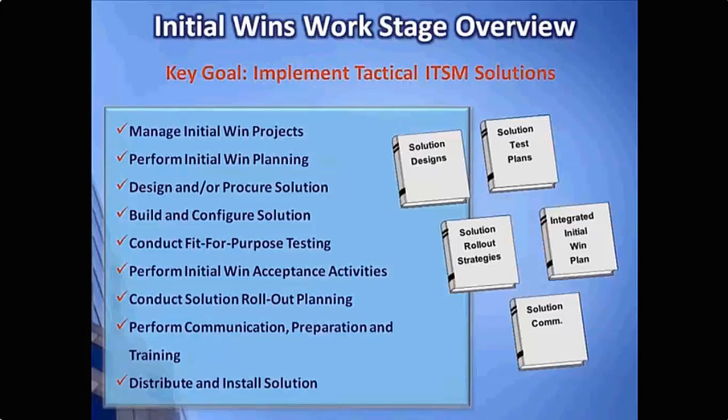One last thing here is to remember that in each initial win project that you run, always think of those 4 pillars of the solution. You will be designing and transitioning process, technologies, organization, and governance and reporting. So those will all become part of the scope of your initial win effort as you move forward.